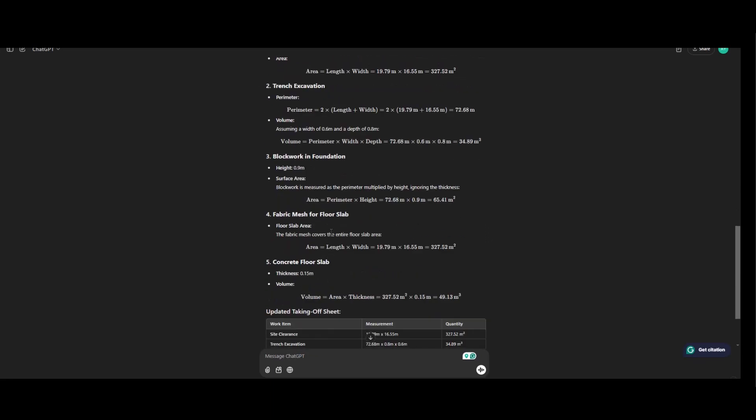Block work that we said is going to recalculate. So the perimeter multiplied by the height. We stated the height is 0.9 meter. So we have 65.41 meter square. Fabric mesh is taking the length and the width of the whole site because we did not specify the area of our building.